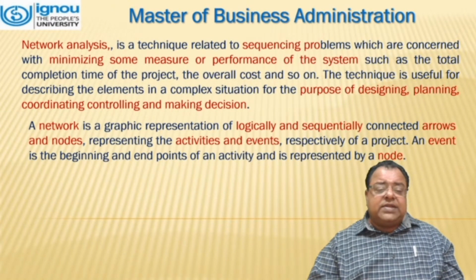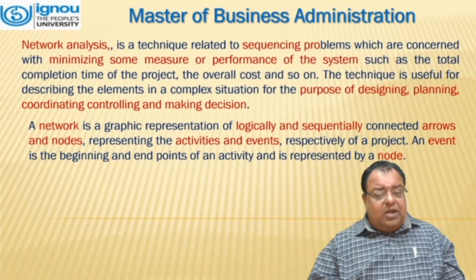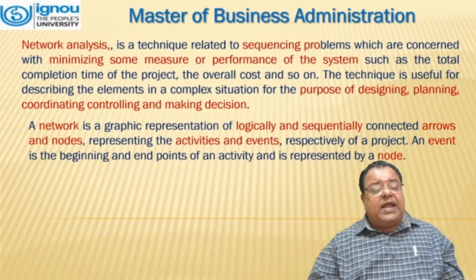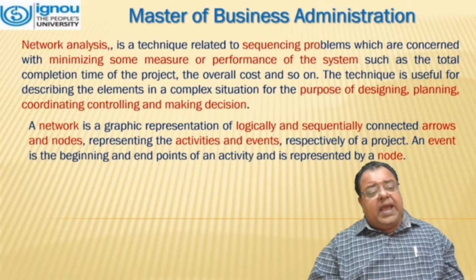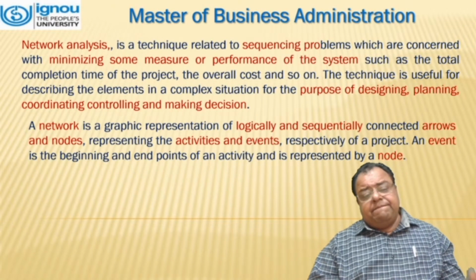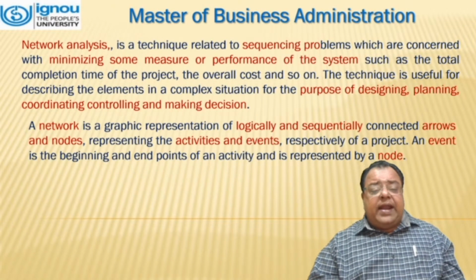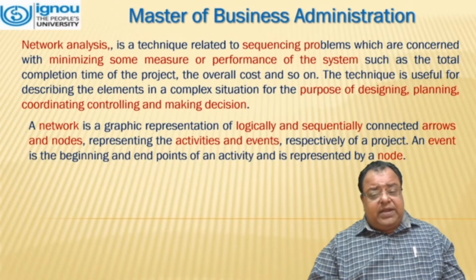A network is a graphical representation of logically and sequentially connected arrows and nodes, representing the activities and events, respectively, of a project. An event is the beginning and the end point of the activity and is represented by a node.